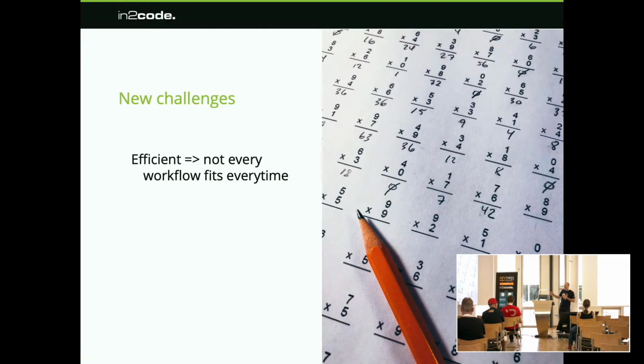I know it's important, but you have to balance it out. So in my team, we found a work style where we do 2-week sprints and try to reduce the time of reviewing by having peer reviews. So you always have to adapt, always think about what is the right approach.